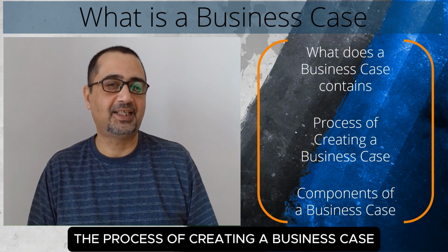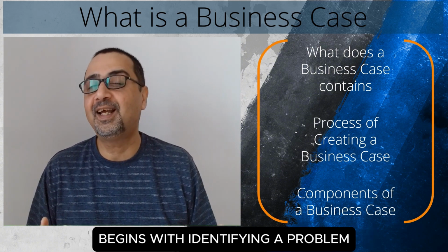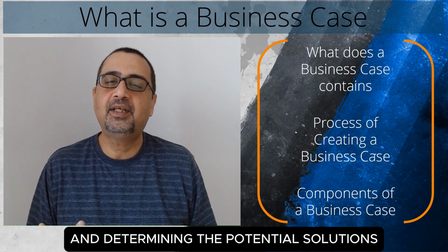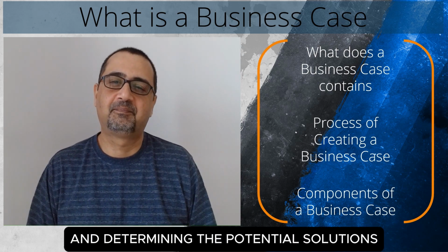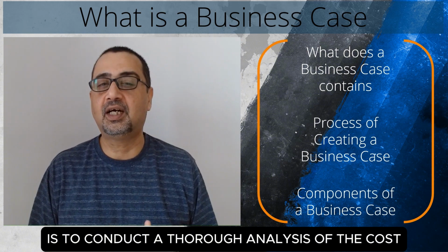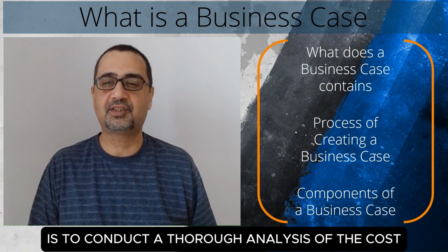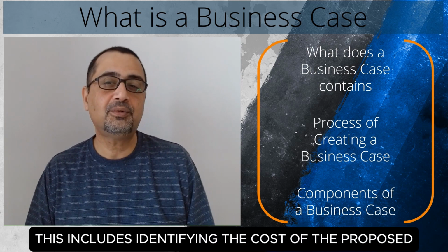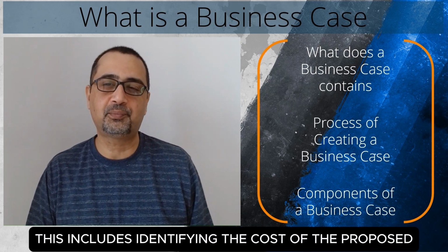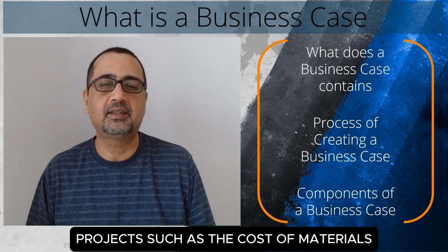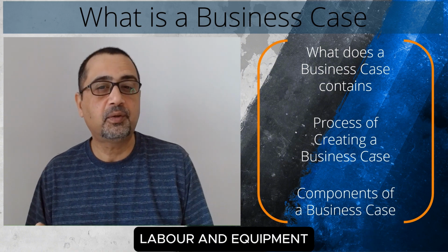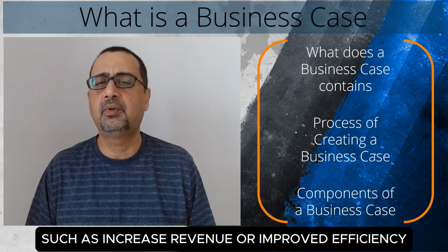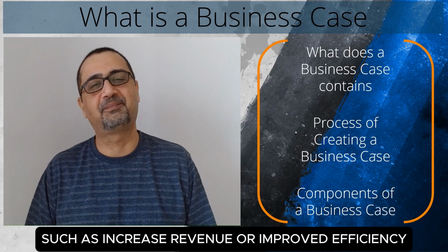The process of creating a business case begins with identifying a problem or opportunity and determining the potential solutions. The next step is to conduct a thorough analysis of the costs and benefits associated with each solution. This includes identifying the cost of the proposed project, such as the cost of materials, labor, and equipment, as well as the benefits of the project, such as increased revenue or improved efficiency.